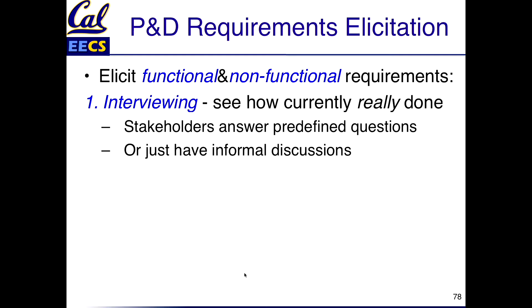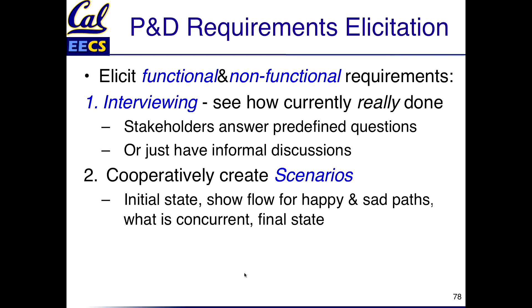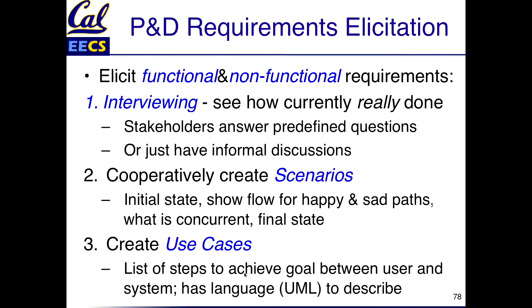The project manager tries interviewing — you want to find out how the work is really done, not the way it's supposed to be done. Maybe you send a questionnaire to all the stakeholders, or just have informal discussions, trying to figure out how it's really done today. You work with the customer to create scenarios: the initial state, the flow for happy and sad paths, what can be done concurrently, and the final state. A third approach is use cases, using the Unified Modeling Language — UML — which has stick figures showing all the steps from user and system to achieve the goal.